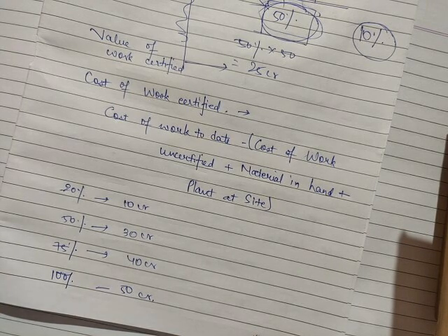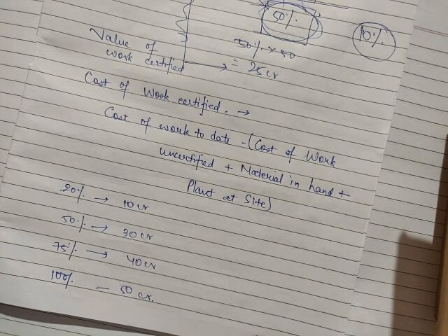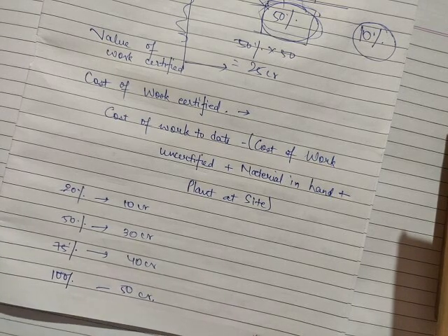Now that is also the case with contract costing. The contractee, that is, the person who has given the contract to make the road, will define certain terms and conditions, that he requires this quality of raw material to be used. He wants the contract to be completed in 5 years, and such other terms are specified in advance, that is, before the start of the contract. So the contractee generally keeps some amount payable to the contractor with himself as security deposit. If these terms and conditions are not satisfied by the contractor, the contractee will deduct the amount.